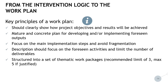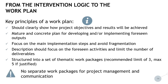The total number of work packages can be increased to a maximum of five if justified content-wise and by the complexity of the project. Please note there is no separate work package for project management and communication. Project management is to be described in another part of the application form, and communication should be an integral part of the thematic work packages. For further details, I would advise you to listen to the tutorial on communication.